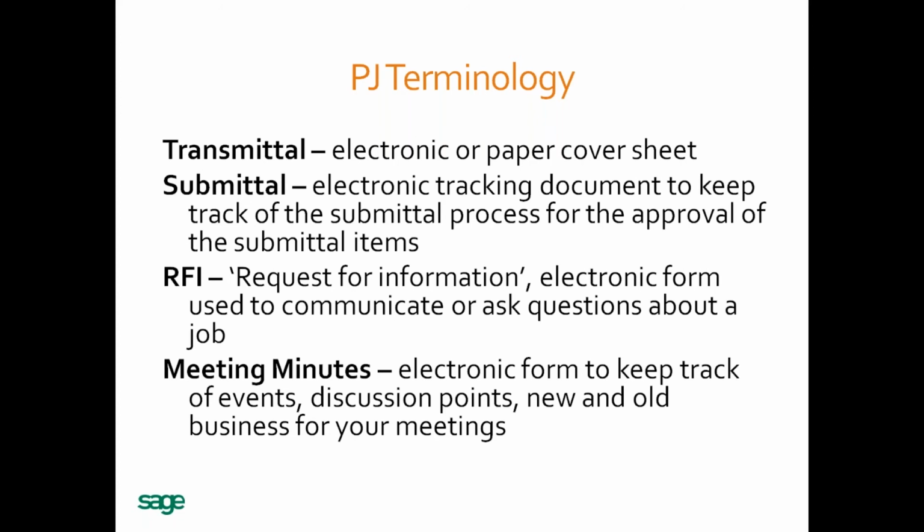I'm going to point out in this session and in the future sessions that the job exists in both modules. So the job ID itself is really the link between the two modules. Each module holds different information between them. Over in project management, you're going to see documents. You can run reports there that show you any changes that have come through, but you're not going to see any totals on that job. All of that is stored over in the JC module.